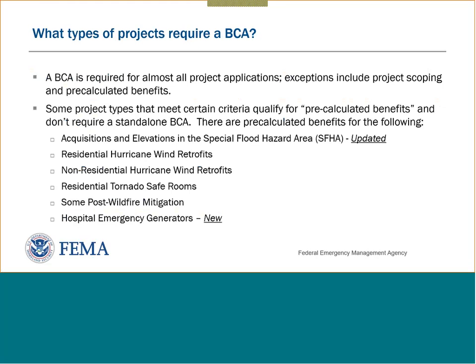Okay, what sort of projects require a benefit cost analysis? Well, pretty much anything that revolves around construction is going to require a benefit cost analysis. The exceptions are if you're doing any sort of project scoping, that does not require benefit cost analysis, or a project where you can use what we call pre-calculated benefits. And I'll just talk about those briefly here.